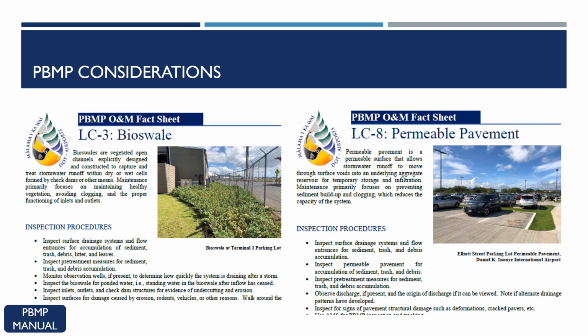Designers will also need to develop a PBMP O&M plan. For state projects, DOT airports will be responsible for long-term maintenance. For tenant improvement projects, tenants will be responsible. Applicable O&M plans and warranty information will need to be submitted to AIR-EE prior to the closing of the project.